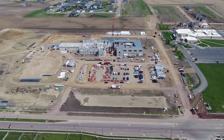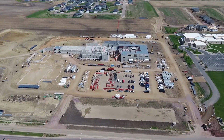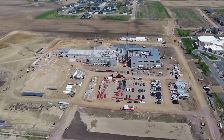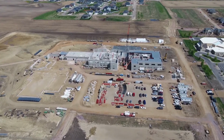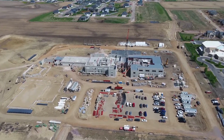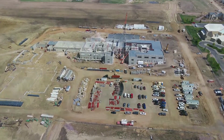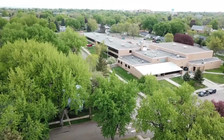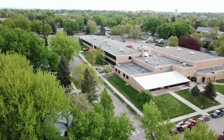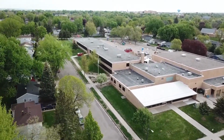That's the on-site stuff. But as far as products, so far things have been pretty good. We've had to make some changes with floor tiles that are made over in Europe, and try to find and substitute some products that are here locally in a warehouse, so we know we can get them. I only know of one item. It's an elevator at Laura Wilder that is probably not going to make it in time for our construction time frame. So that's the only thing that I've seen that's impacting us right now as far as schedule.